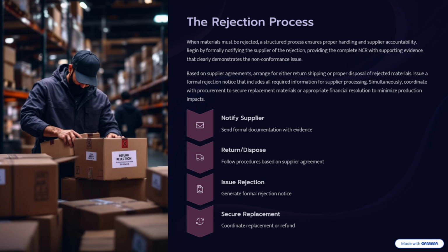to the management. After that you will get a notification, yeah, this kind of material has to be returned back to the supplier, because there is some payment, the payment will come also, LPOs and everything is there. So you need to ensure that a return procedure is agreed before returning the material. Then once everything is done and agreed on the way of returning, you will attach the delivery note with your NCR plus a rejection form.